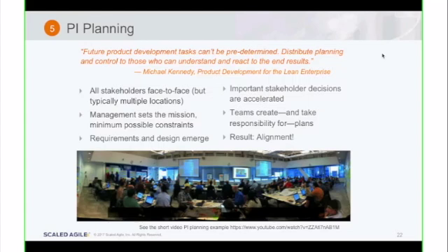So this is where I think program managers add a lot of value. Yep. Right, because teams tend to actually become competitive, is what I've seen. Each team wants to make sure they get their commitment met, and so you need sort of a program management that oversees that value stream that we've been talking about and ensures that the value stream is what gets priority, not each individual team's needs.